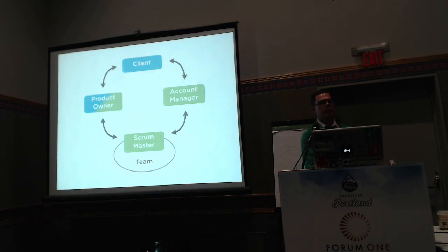So we know that there's something, we kind of plan for that. So we know that we need to load a project with more designers and strategists at the beginning of a project and at the end. So we can predict that a little bit. Resourcing is a major problem for all consultancies. And it's extremely difficult and confusing.